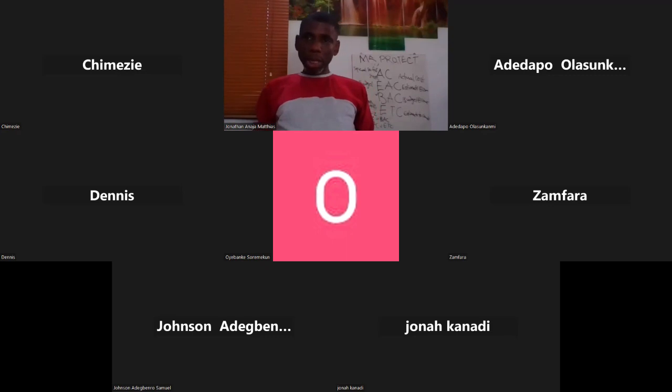Yes, there is. You can go to that resource sheet and instead of choosing material, you can choose work and put the unit in hours. There is another way to do it. There are 2 ways. I'll show you the other way in our next class. But you can go to that resource sheet. When I list my material, I change it to material. So you can leave it at work. Then the unit will be in hours. Then you can apply, then you can pick it there.